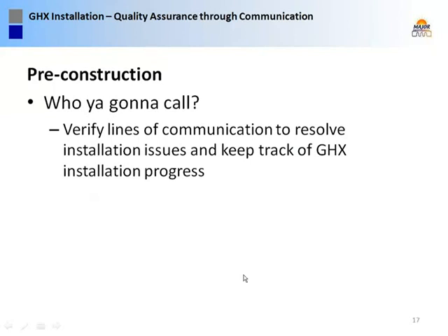Finally, during your pre-construction meeting, it's a chance for everyone to exchange numbers, names, and who does what. So if you do have an issue, people know how to communicate. And I found that so many jobs go without a pre-construction meeting and no one knows who's doing what, and it's always a zoo when no one knows who's responsible for what. And this is how a lot of jobs get cross-threaded and actually get very problematic.